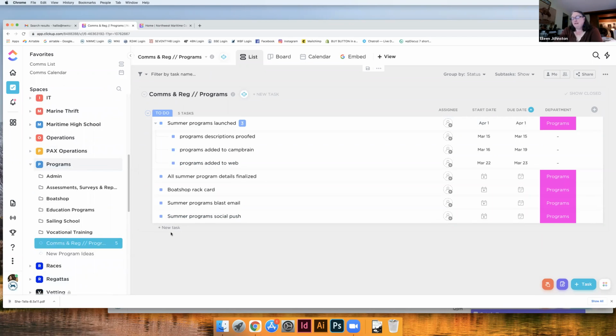Okay. Hi, it's Eileen. Can you assign a task to more than one person? Yes, you can. We want to be careful when we do that, because the more assignees a task has, I think the less clear it is who's actually supposed to be doing it. If, for example, there's a task like everyone read the document that Hallie sent, and there was only one task and it was assigned to 5 people. If one person changes the status of that task, it will change for everyone. So that's a limitation there.